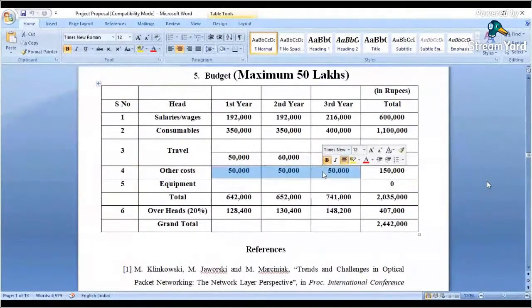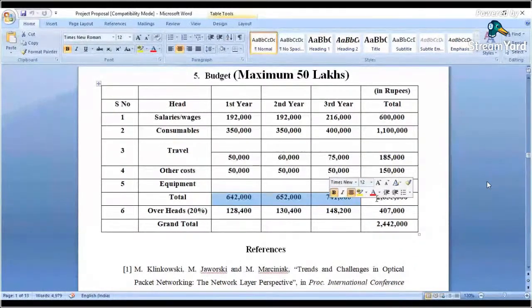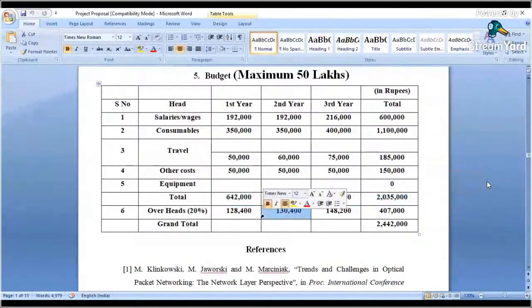This overhead basically is the example which I gave you, that if you have like a software which you are going to purchase, and the quotation is let's say 10 lakhs, but that quotation is valid only for 3 months, but the project evaluation and the grant of funding takes 6 months. So in that 3 month gap that we have, the cost of the software or the experimental test bed will increase. So this overhead of 20% will take care of that cost difference which we have, right?